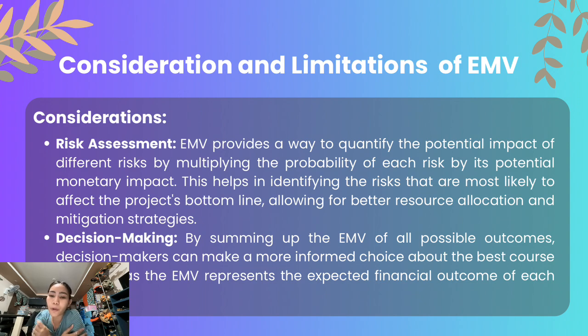So, for example, again, in option 1, we have a 50% chance of earning 100,000 and a 50% chance of earning 0. So, 100,000 or nothing, 50-50 chances. In option 2, we have a guaranteed 40,000.